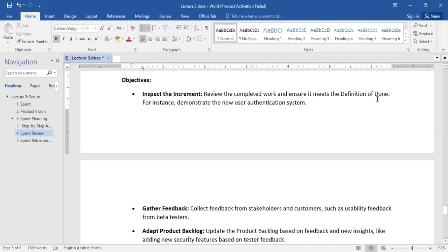So that is it. Before the developer reaches out to tell you that he's done, you would have already set and determined an acceptance criteria for this definition of done. So when they are coming back to you, you are not going back and forth on what each of you considers as your definition of done, because the acceptance criteria has already been determined from the get-go.